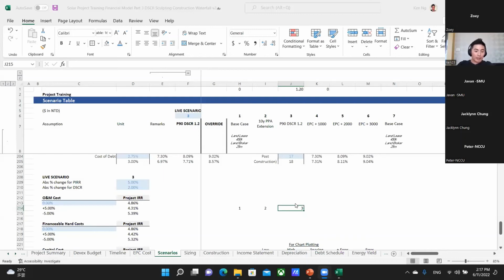So basically at land conversion, we have spent $15.2 million over here, right? Land conversion happens in September. Now, upon land conversion, if we hypothetically sell the project at that point in time, the incoming buyer would still need to spend all this money, the remaining $13.5 million, right?